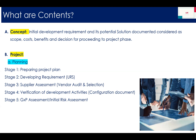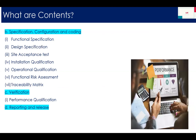In the specification, configuration, and coding part, we need functional specification, design specification, SAT, then IQ, OQ, and functional GXP assessment, and traceability metrics. Then in the verification part, PQ comes — when we check the performance of our software according to our requirements. Then reporting and release: whatever we achieve with this validation project part and how we can release the software for routine use.